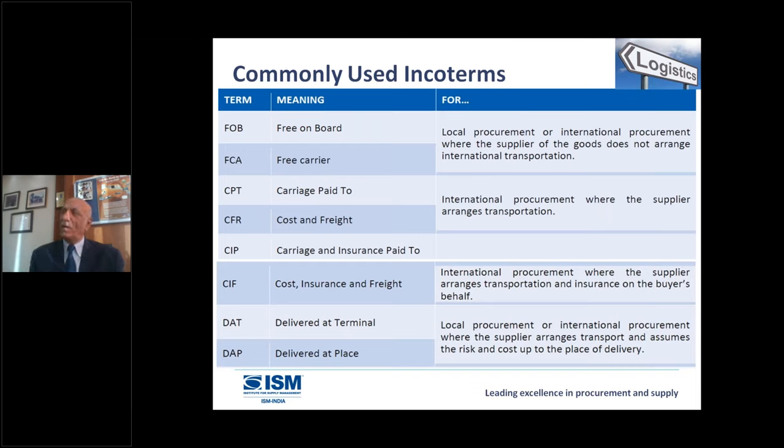Now the shipment has come, the consignment is there with you. The consignee should perform a cursory inspection of the package. This is a practical tip; I wrote one shipping guide when I was at the UN. I think this is very, very important. It is very common that we receive the goods and just say received. What does it mean, received, nothing? You have to say very clear words: received in good external condition, contents unchecked. If I just say received and tomorrow we find it's broken inside, it basically defeats the purpose. Since you don't have time to open up and check everything, say: received in good external condition, contents unchecked.